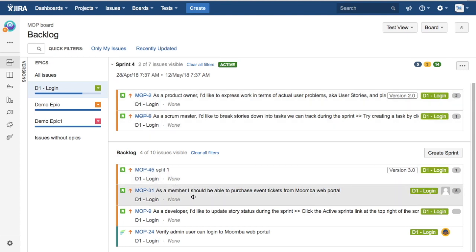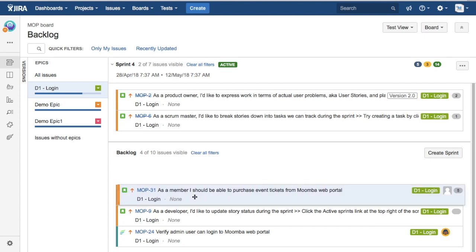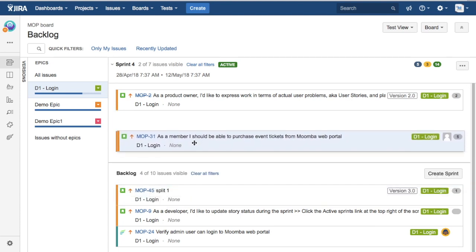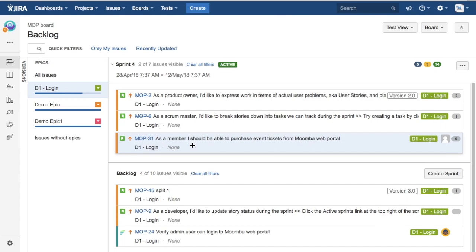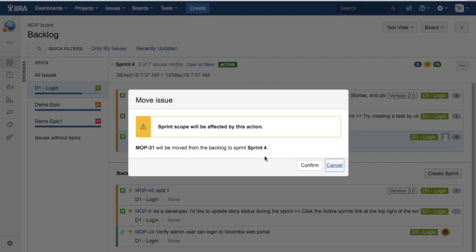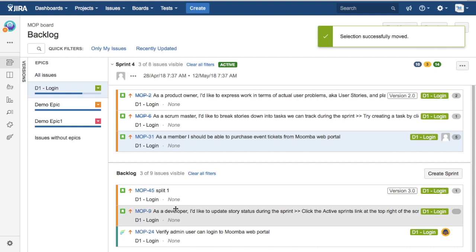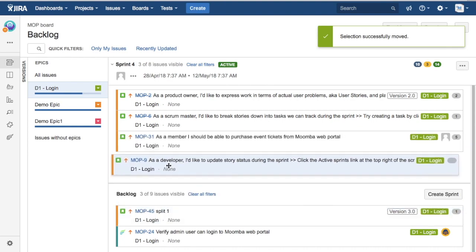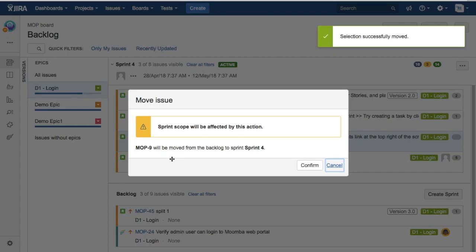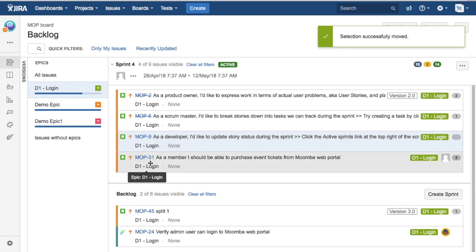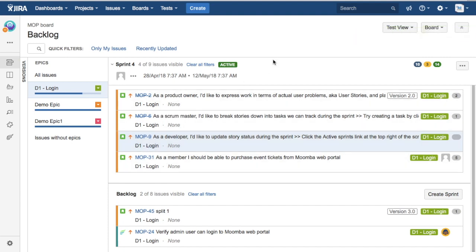Now if I want to add a few more stories to the epic from the backlog, you just need to drag and drop the user stories and confirm. The user stories will get added to the epic from the backlog to the current sprint. It's showing you the pop-up that sprint scope will be impacted because this is an active sprint.